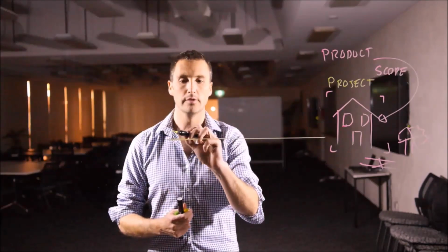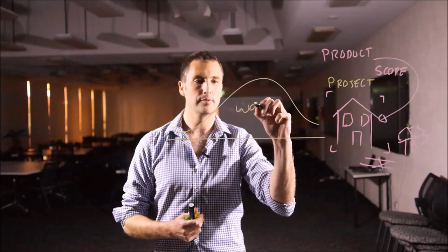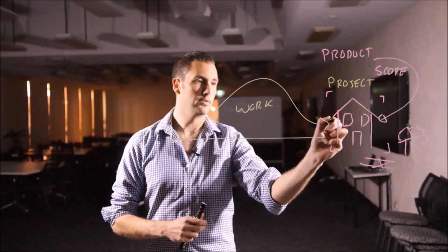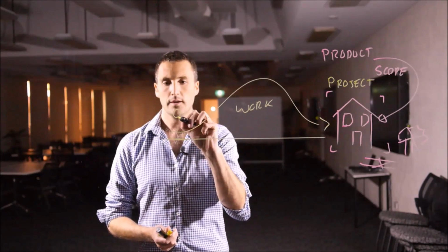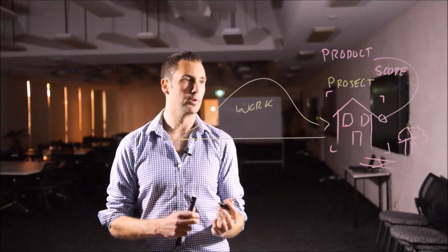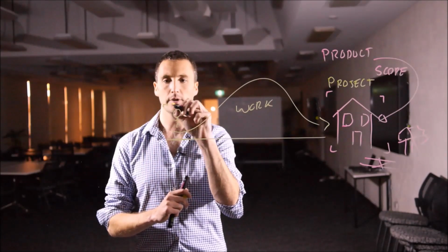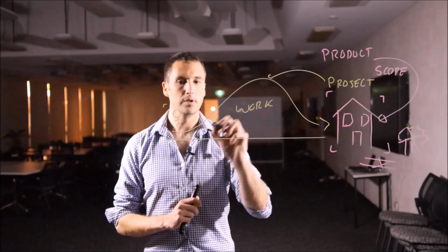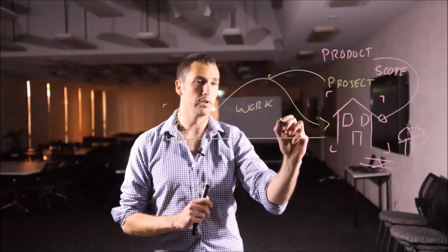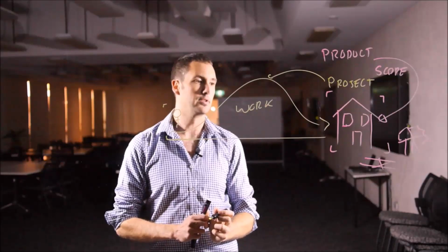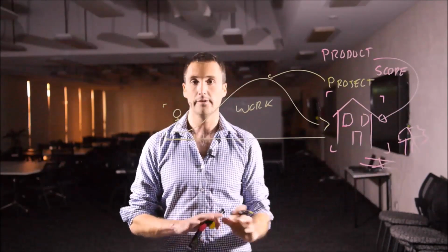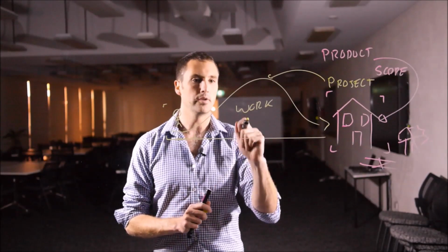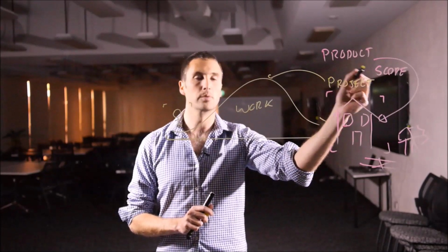The project scope becomes a function of this product scope. Effectively, we work backwards, and we seek to identify all the work required to yield this output. And this is relative to our starting point. So we're right here at this stage in the project. The scope, the project scope, is all of this work and only the work required to output this. Not the work required to do this and this, because that's outside. It's only the work required to output the agreed product scope.